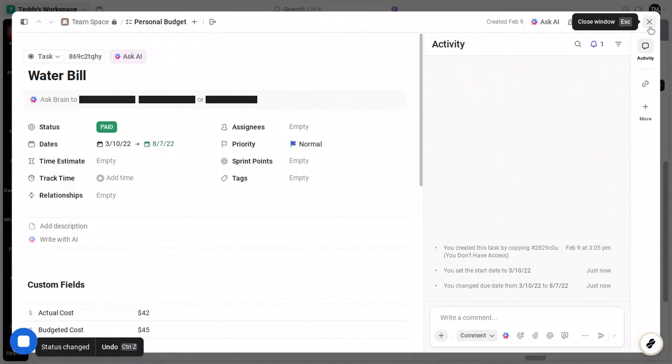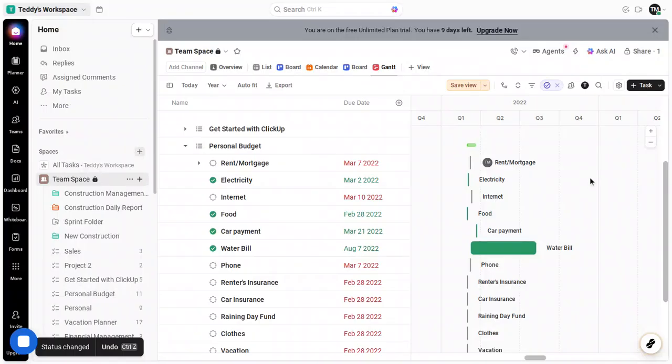In the same settings area, look for options related to highlighting. Click Highlight and choose a condition you want the chart to emphasize. For this example, pick Complete so the chart draws attention to tasks that have reached the finish line. When you apply this highlight, completed bars might appear more prominent or stand out in a particular style, helping you isolate what's finished in a dense timeline.